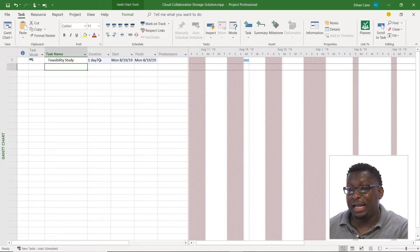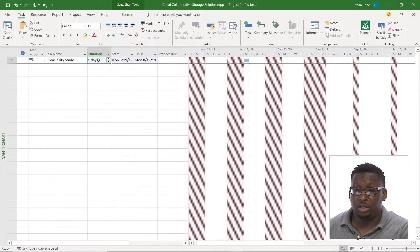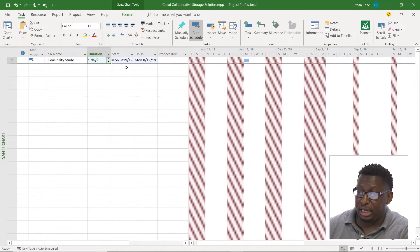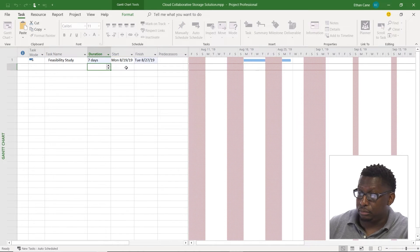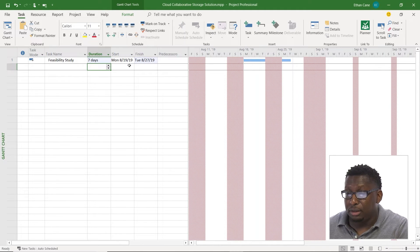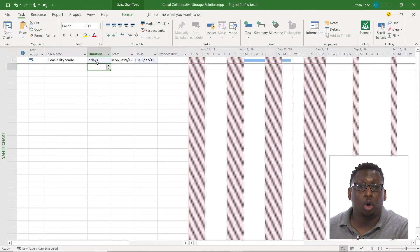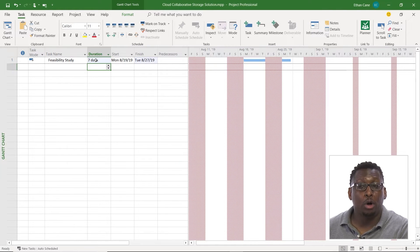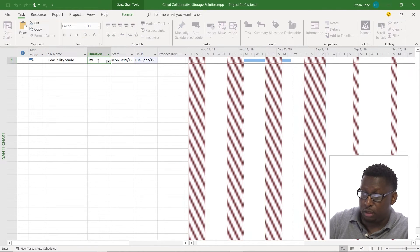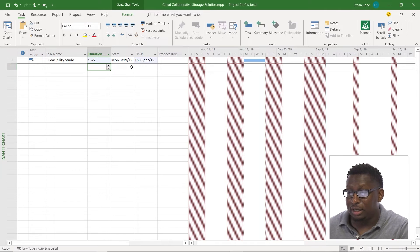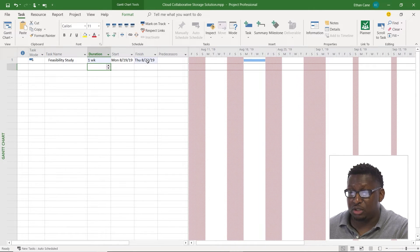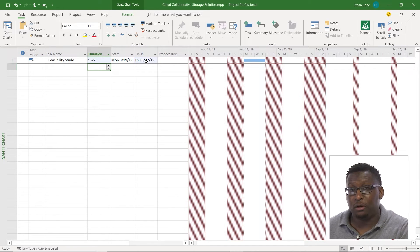Now I can start entering in durations, let's say I put in seven days here. This is going to be seven work days. So the default unit is days, work days. Let's say I do one week. It's going to do a work week. So it stops, it finishes on the 22nd, that's not a week folks, that is a work week.